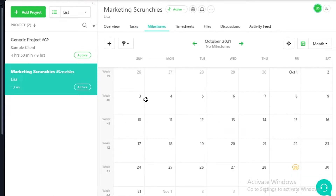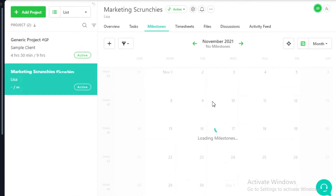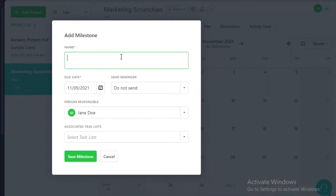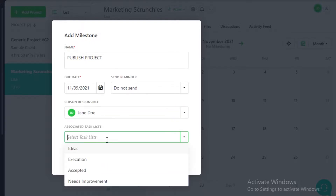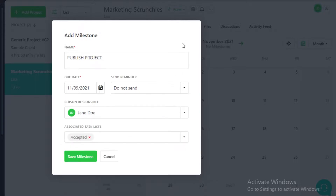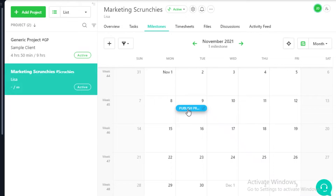After that you have milestones, which are denoted on a calendar. For example, if you want a milestone on November 9th to publish the project, you can add the person responsible, associate relevant lists — such as requiring the accepted list to be fulfilled by that date — and then save the milestone. You can also add a reminder.